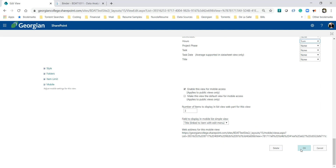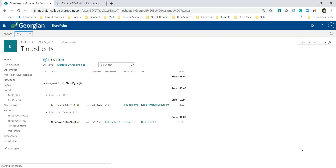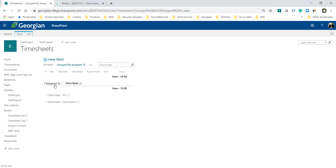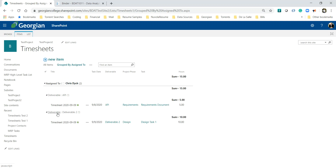We will also add a total for hours. What it's going to do is sum up the hours, and we can just do that by selecting 'Sum' next to hours. Now we've got a nice little view. You can see my name is first and then I can see the deliverables I've been working on. It's a nice view — I know that I've got tasks I'm doing and I'm applying hours to things that are real. This is very valuable when you're tracking what's happening in a project. Sometimes you may see that someone is not doing enough, or maybe they're not realizing they should be tracking it. In a real situation where they're being paid on their timesheets, you'll be able to look at this view and say, 'Chris doesn't have a lot of hours — we should make sure he's putting in his hours properly so he's actually getting paid.' Believe me, that happens a lot in companies — sometimes people forget.